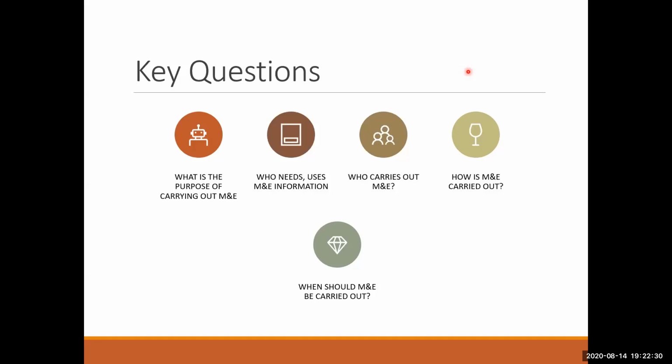So there is a monitoring report. The staff doing it call the people: did you receive the water? And they said, okay, yeah, we received. Did you receive the cash? And they tell them yes, we received it, or not. Did you get this something from us? And they said, okay, we received it. So that will go from the monitoring department to the program, and the program will send it in their report to the donors.